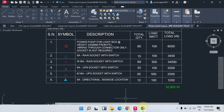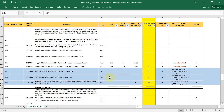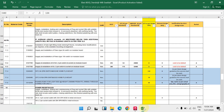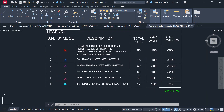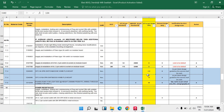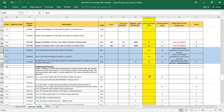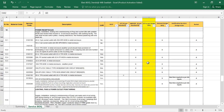The quantity written here may be incorrect — you need to check in your own project how many 6-amp 3-pin switch and socket outlets you are using and enter that quantity. Open the power point layout and calculate, then write down the correct quantity. Same way, power point for lightbox — whatever you have calculated, write 60.